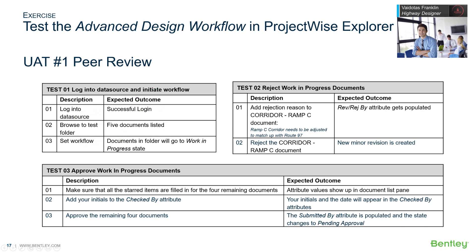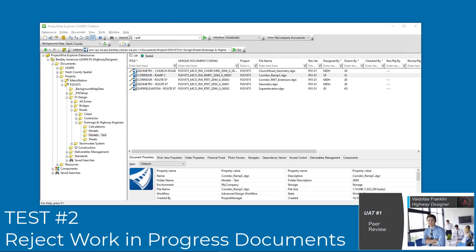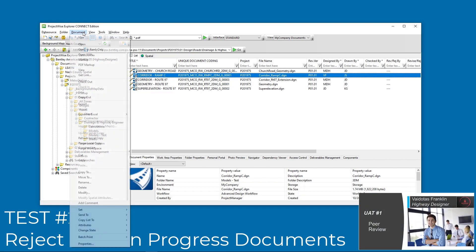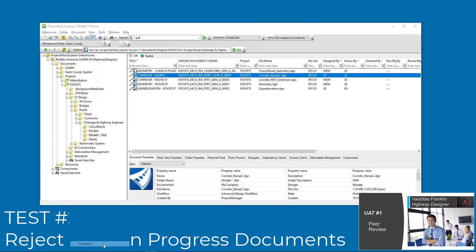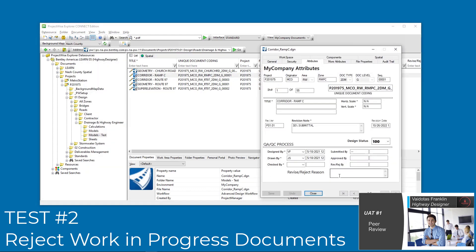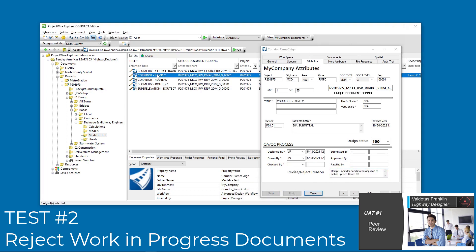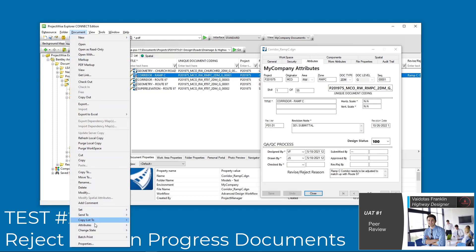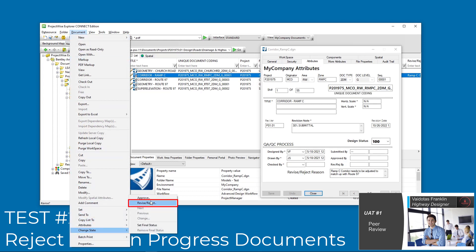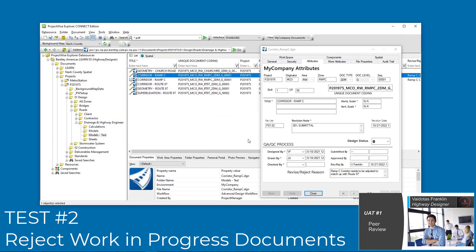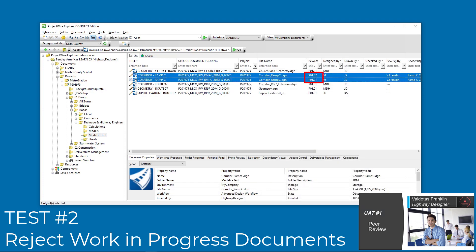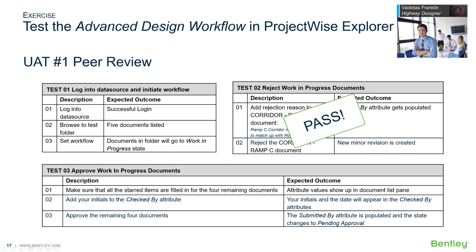Test 2. When Viadotis checked the Corridor Ramp C model, he found that the model does not match up with the Route 97 corridor. Back in ProjectWise Explorer, he enters a reject reason and saves the document attributes. He then rejects the document from the change state menu. A new version is created and given a new minor revision number. Test 2 passes.